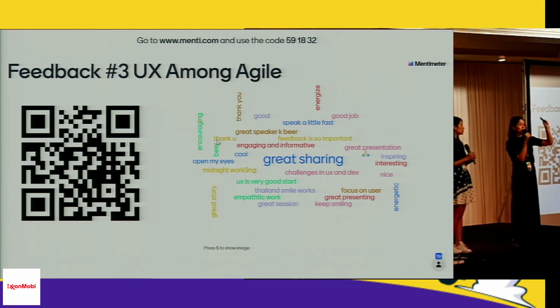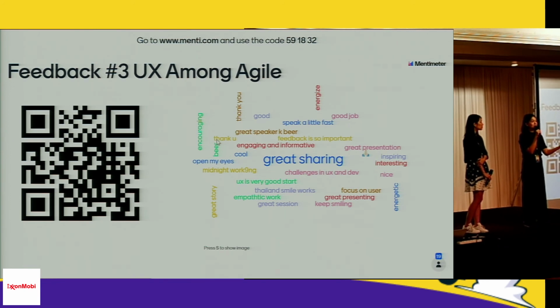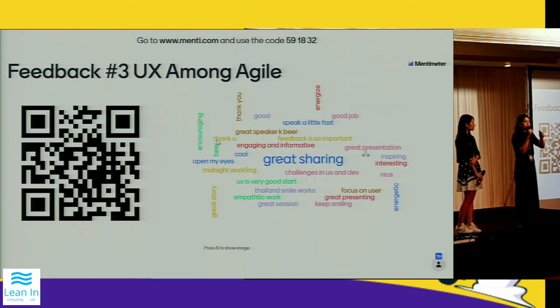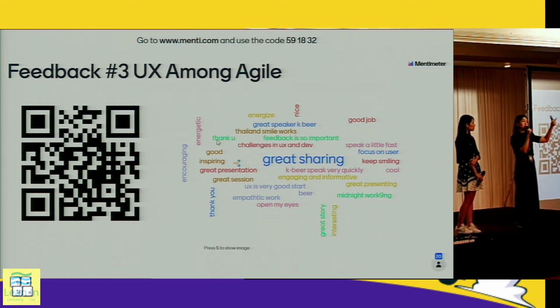So that will be just the medium. But if there is any function that they say we must have, if not, users cannot use this product, for example a timer when they execute the work, those kinds of special functions, then that one goes to critical, the one that users cannot miss in the product.